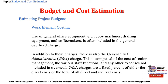In addition to these charges, there is also a general and administrative (G&A) charge, composed of the cost of senior management, various staff functions, and other expenses not included in overhead. G&A charges are a fixed percent of either the direct cost or the total of all direct and indirect costs. Thus a fully costed work element includes direct costs — labor, resources, and special machinery — plus overhead and G&A charges. We advise the project manager to prepare two budgets: one with overhead and G&A charges, and one without. The full-cost budget is used by accounting to estimate project profit, while the direct-cost-only budget gives the project manager the information needed to manage the project without being confounded by costs outside their control.